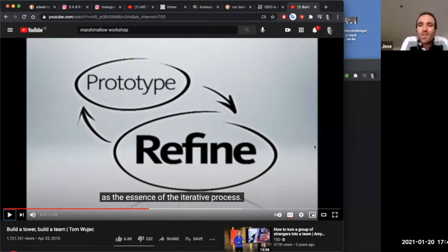So they invented Agile. And what you do in Agile is very similar to what you do in design thinking. You build an app by talking to the customer, and you work for 2 weeks, and then you build some feature of the app, you show it to the customers, you test it in the market, you learn something, and then in the next 2 weeks, you use that knowledge to improve. And in this way, you don't work blindly for 2 years to then find out that what people wanted is something else. Does it make sense?